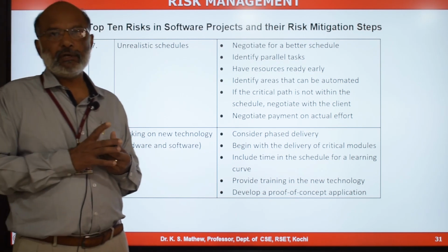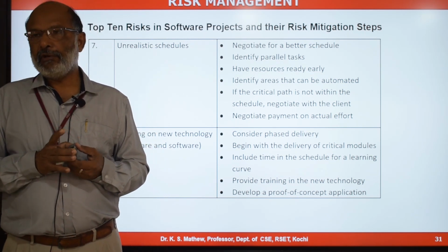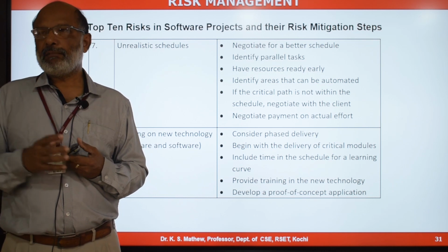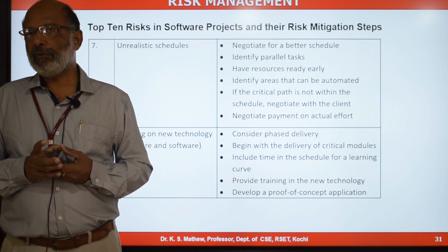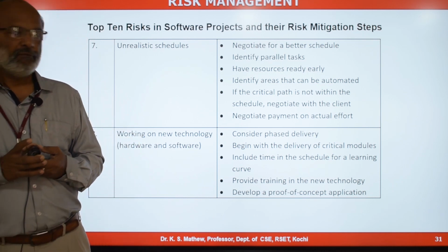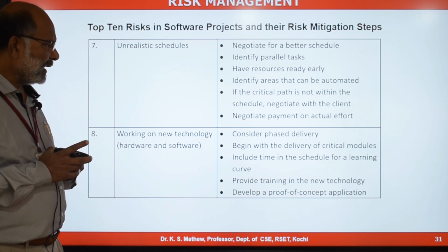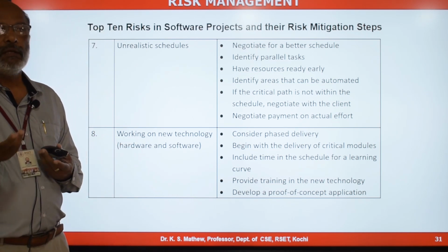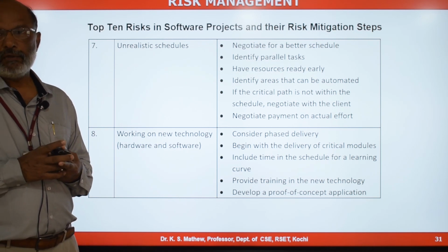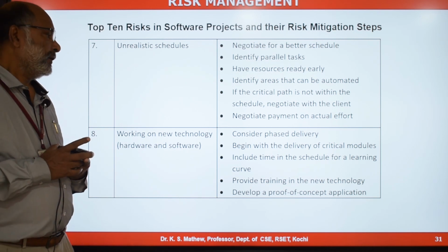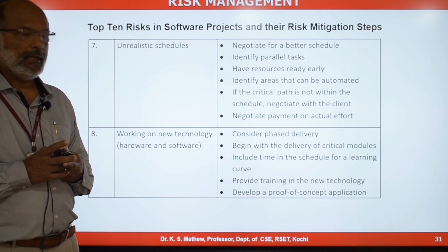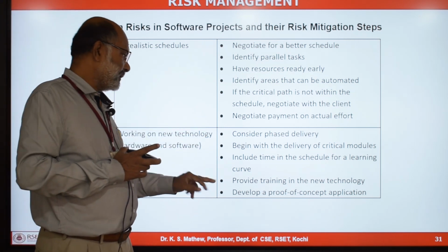Whenever you use a new technology, when you do the estimation, always try to include some additional buffer time for taking care of the learning curve required for learning the new technology. Provide training in the new technology for the team. Whenever you work on a new technology, software and hardware environment, you need to plan for training the team. That is another way to mitigate that risk.